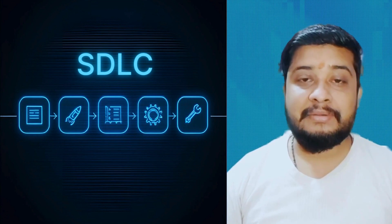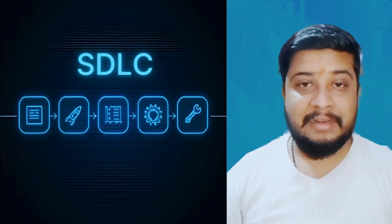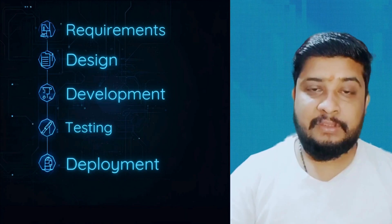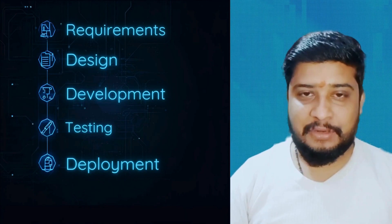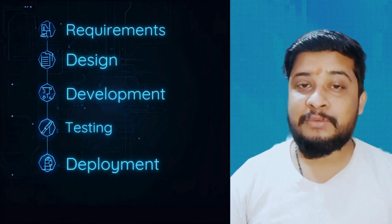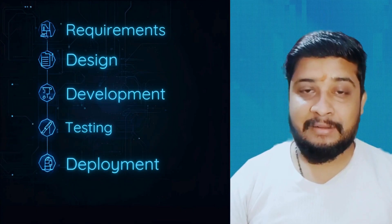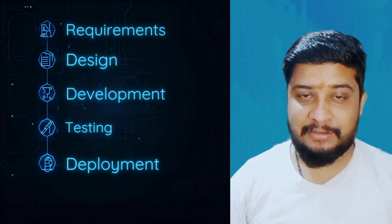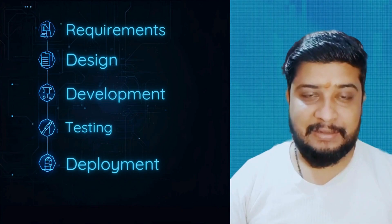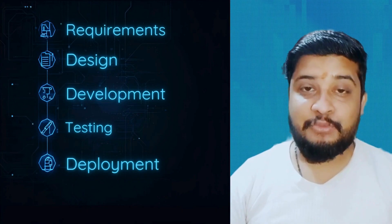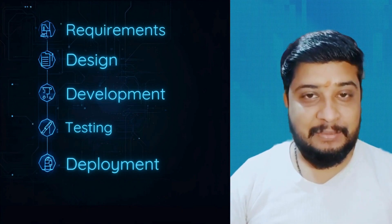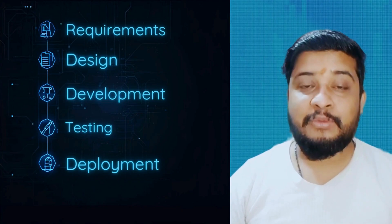Every IT company follows these steps. The difference is how they follow these steps — that's where Waterfall and Agile come in. Waterfall is the old traditional SDLC model. It is linear and step by step: you finish one phase entirely, then move to the next. There is no going back.